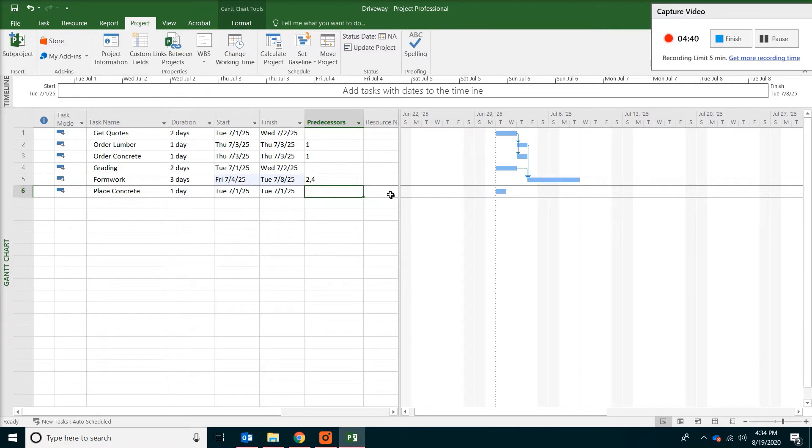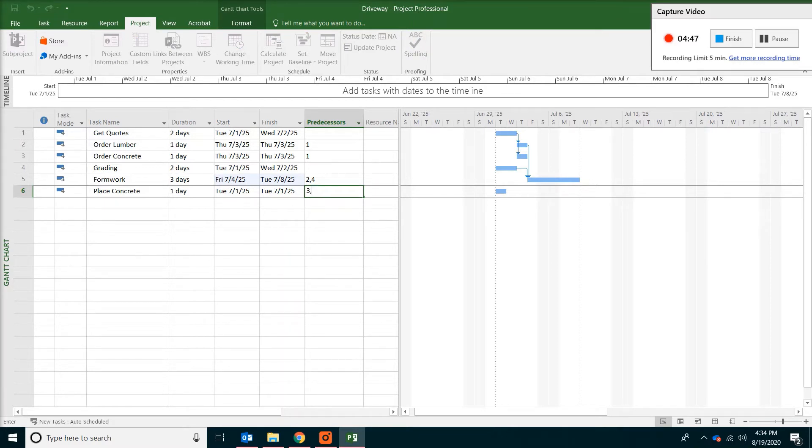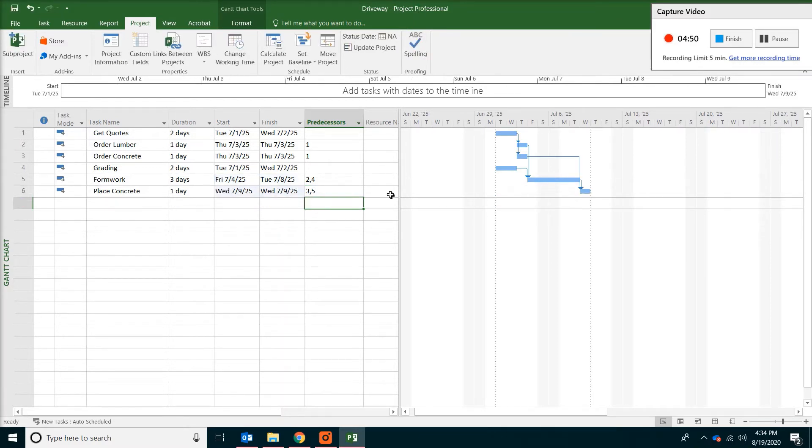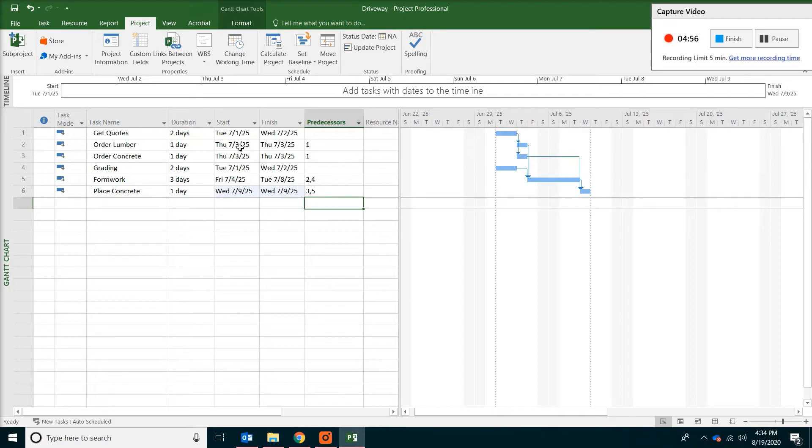The same thing with concrete. We need the concrete for the material. With a comma. And also we need the formwork to be complete. So three and five. That pretty much completes the basic work breakdown structure.